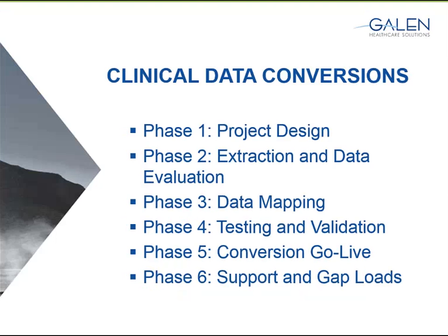The conversion has 6 phases: the project design, extraction and data evaluation, data mapping, testing and validation, conversion go live, and the support and gap loads at the end. For the remainder of the presentation, we'll be going over each phase in detail, looking at the action items and considerations for each phase.